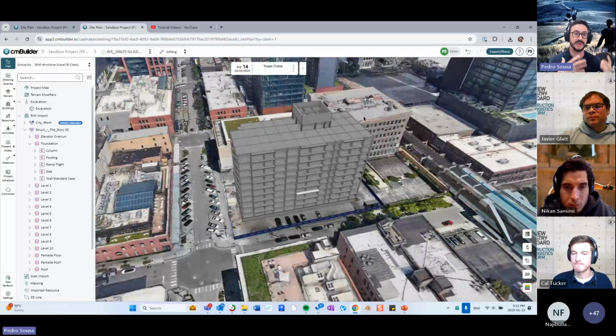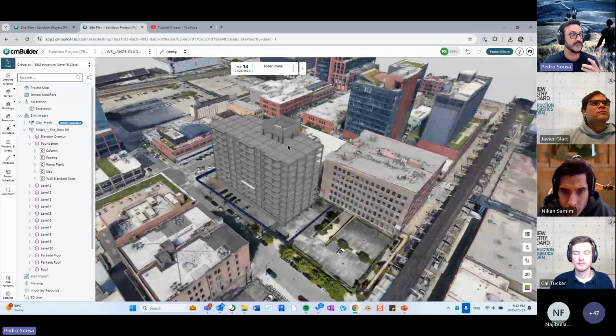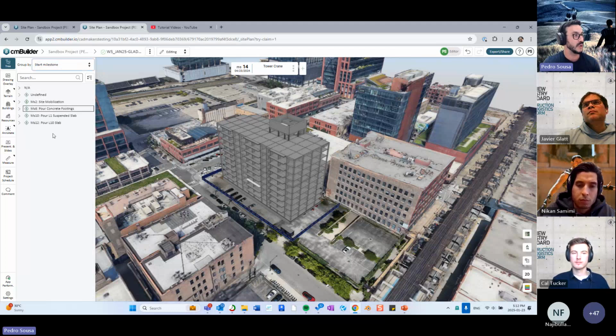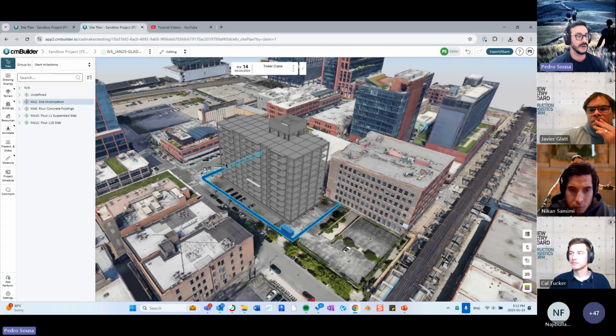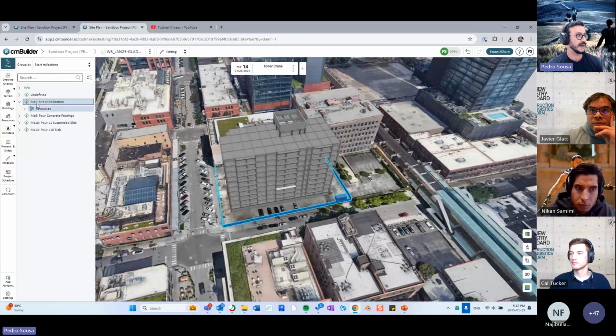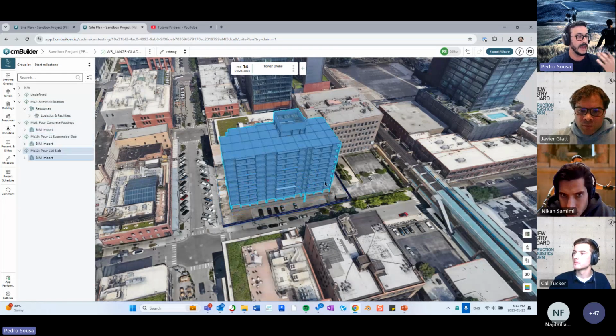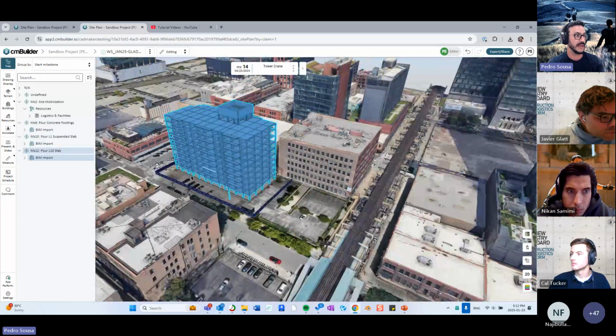And sometimes you're going to be doing this work and you're going to notice a couple of things that you did wrong, or you don't know exactly what is connected to what milestone. And I think that is a very good practice for you to look at these things also by going into the group by milestone and see the start milestone, right? So this will show you which milestones you have something connected to. So when I click on this site mobilization, it will highlight those items, because inside of this milestone, I have resources that have their start date defined to that milestone. Same thing with this guy over here, same thing with these guys over here, and so on and so forth, right? So you have the ability to quickly understand what is connected to your milestones.